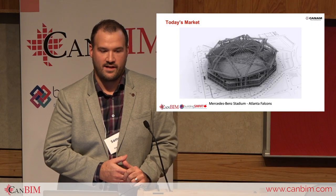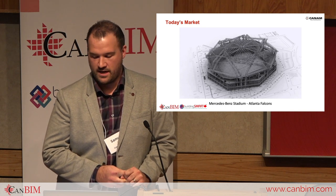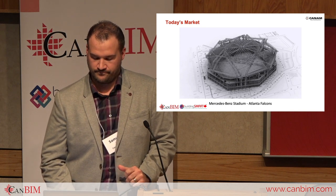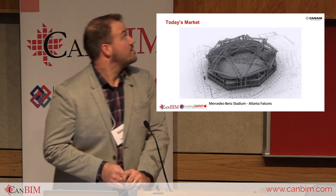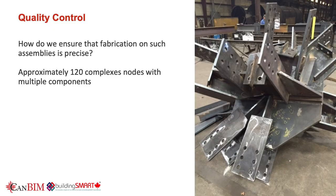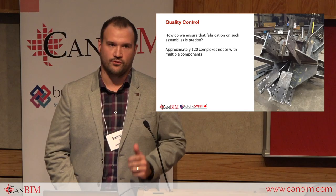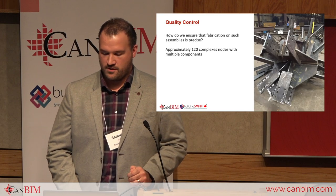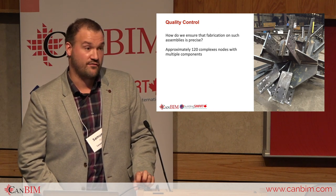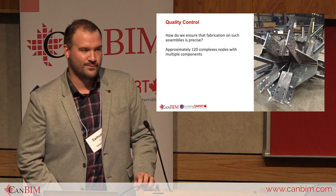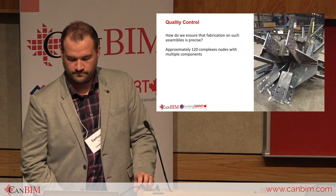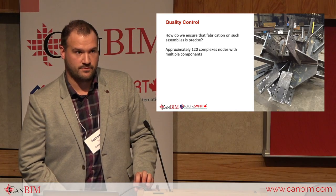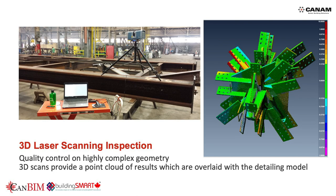It was designed to open and close in less than eight minutes. We'll showcase some BIM processes that helped Can-Am achieve this type of construction. How do we ensure the fabrication is precise on such an assembly? What kind of quality control methods could be used? In a 3D model, this would be just a simple node with multiple attaching members. Once you get to steel detailing, you get a piece that not many steel manufacturers want in their shop. We find approximately 120 of these complex nodes on this project. We used 3D laser scanning inspection — a great tool for quality control and complex geometries. It is a no-touch and non-destructive method.